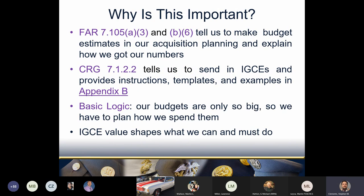Why are IGCEs important? The FAR tells us to make budget estimates for our acquisitions and show how we came up with them, and the CRG tells us we need them. Our customers have fixed budgets — the money can run out each year. We make budget estimates projecting exactly what acquisitions we plan to make, so when we make requirements packages we just rename that part of the budget estimate as the IGCE. Getting the IGCE right is critical because your requirement's dollar value determines what you and contracting can and must do to make the purchase.